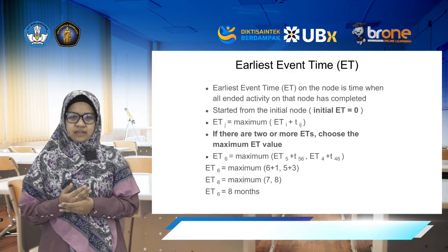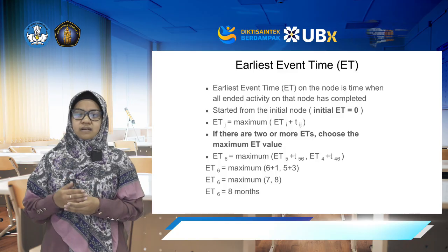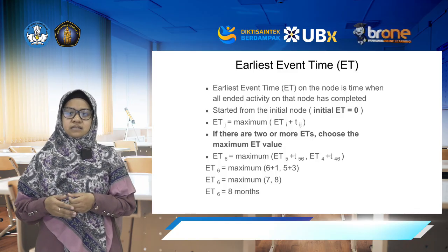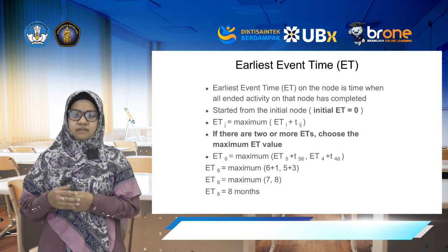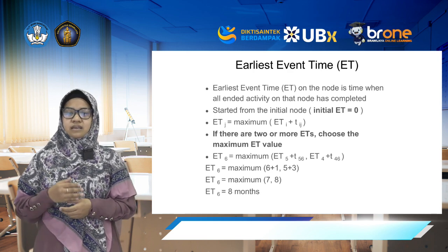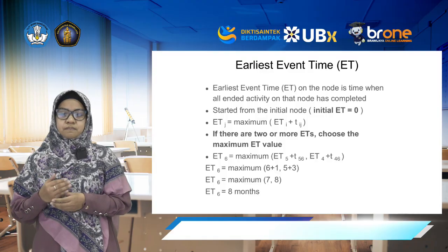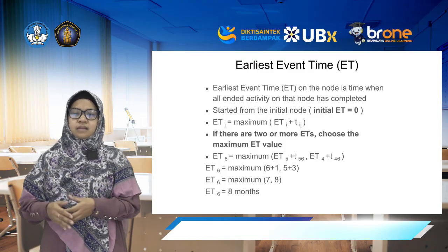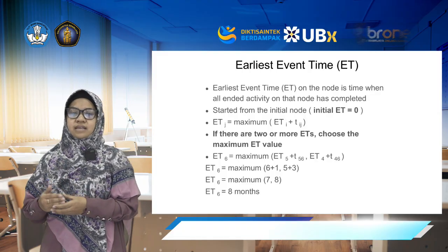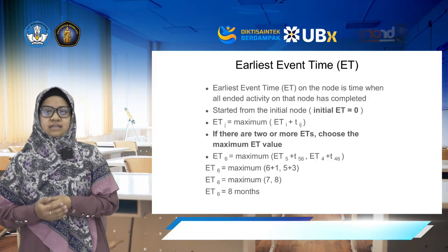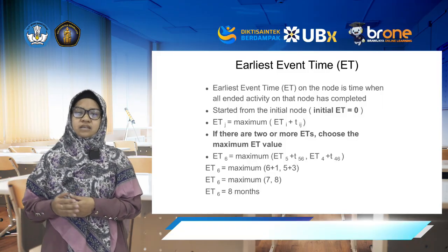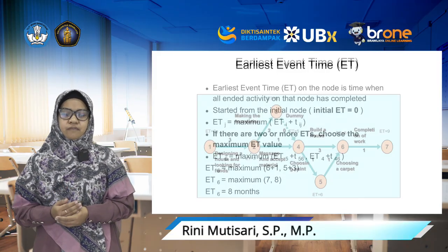For each activity, its earliest start, or ES, is the largest earliest finish among its direct predecessors. Its earliest finish, or EF, is ES plus its duration. Move left to right until the end. The biggest EF at the final node is the earliest project completion time. Now we go backward to see how much flexibility we have.